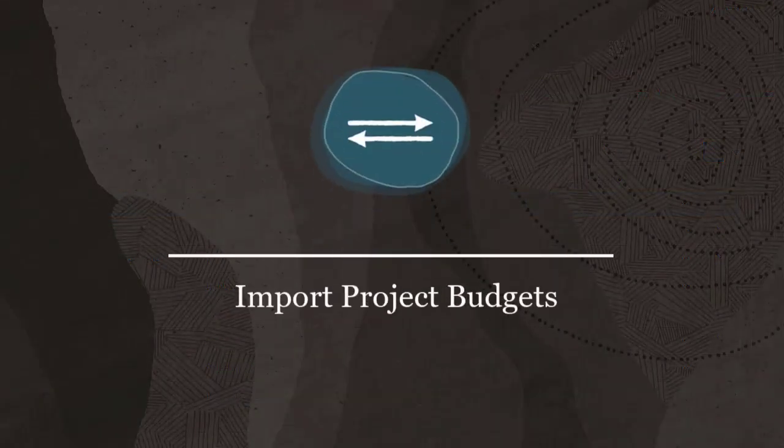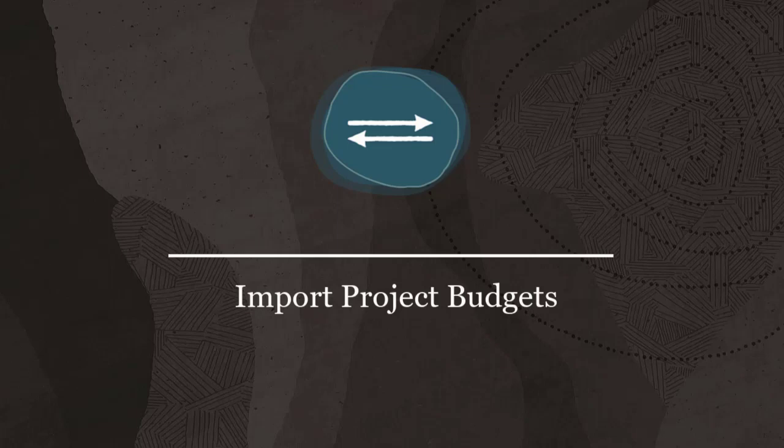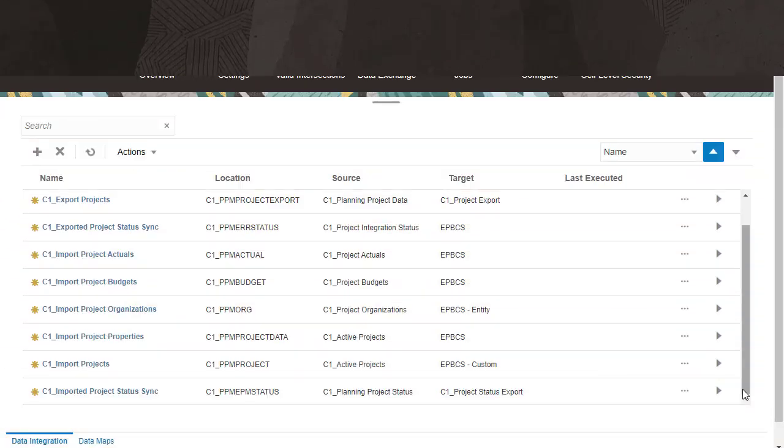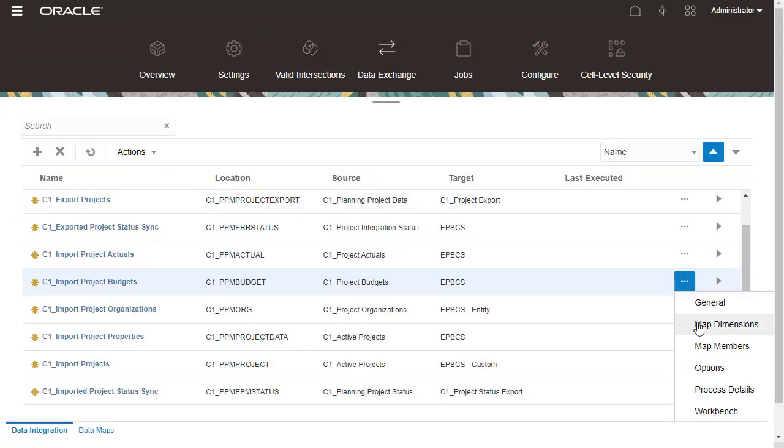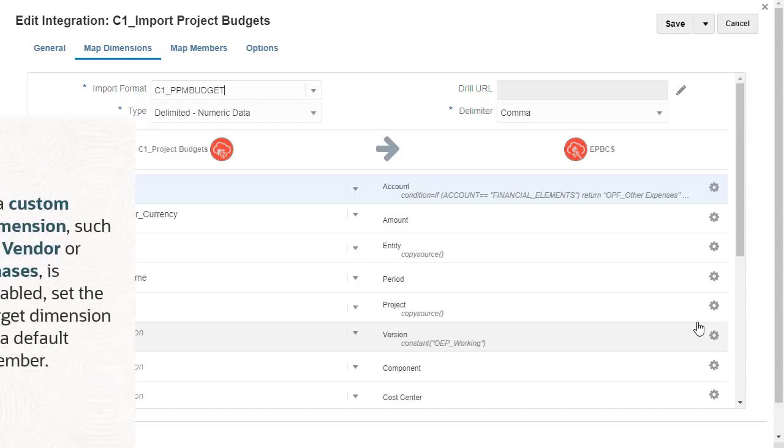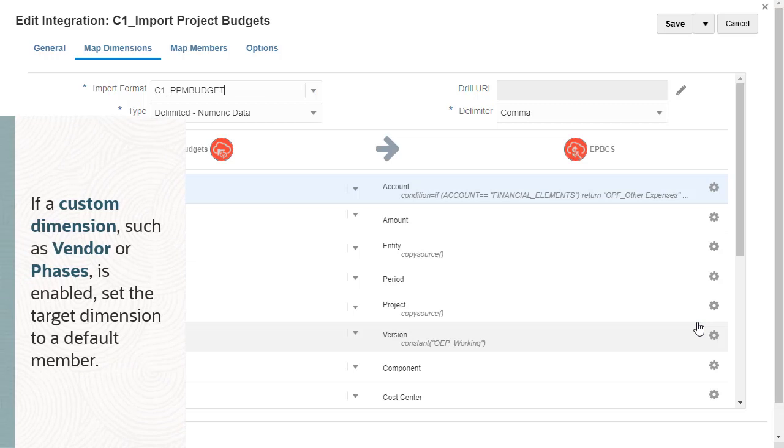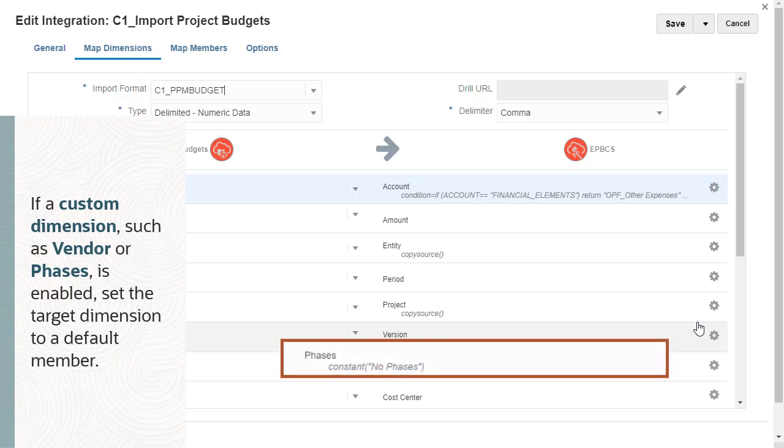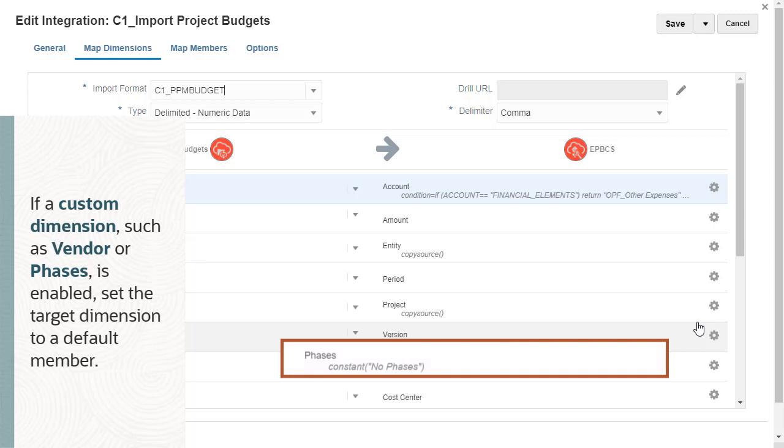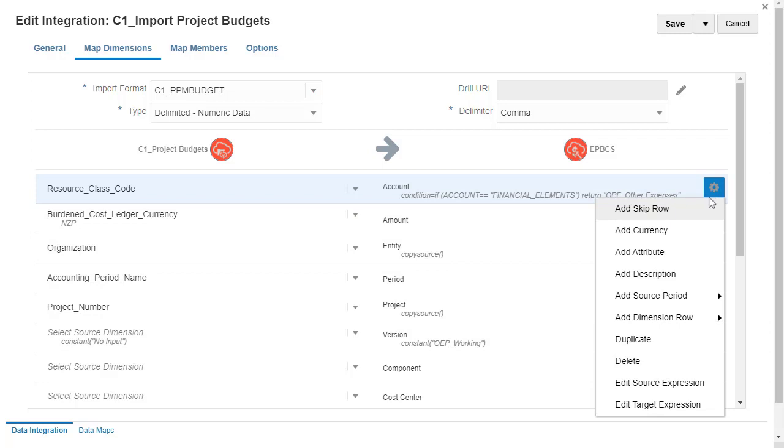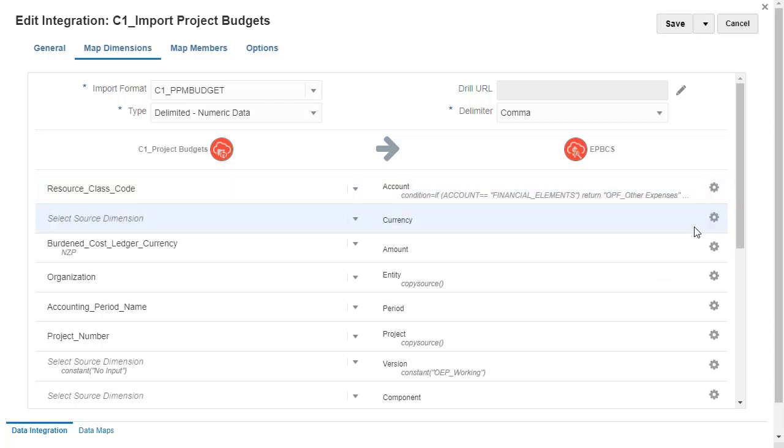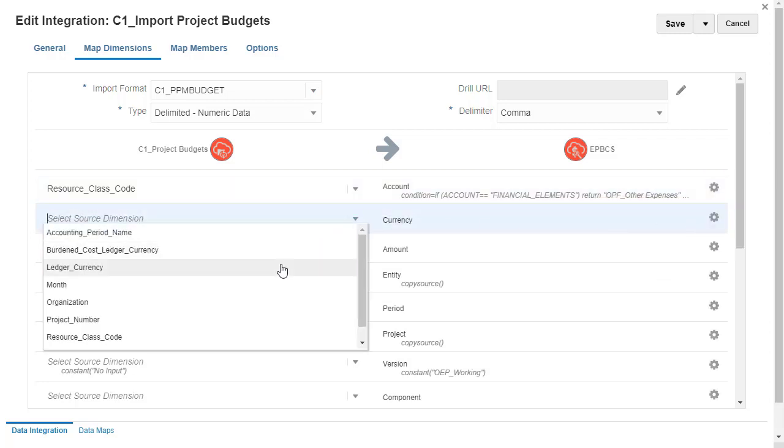Import Project Budgets. I'll edit Import Project Budgets. If a custom dimension, such as Vendor or Phasis, is enabled, set the target dimension to a default member. Map the Ledger Currency source dimension to the target currency dimension.